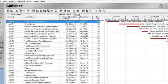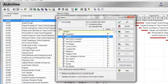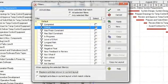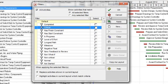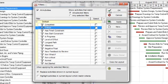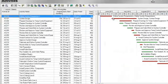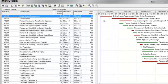Now click on the filter button on the menu again and click on the box labeled All Activities. Click on Apply and OK. Now the layout shows all activities for the project.